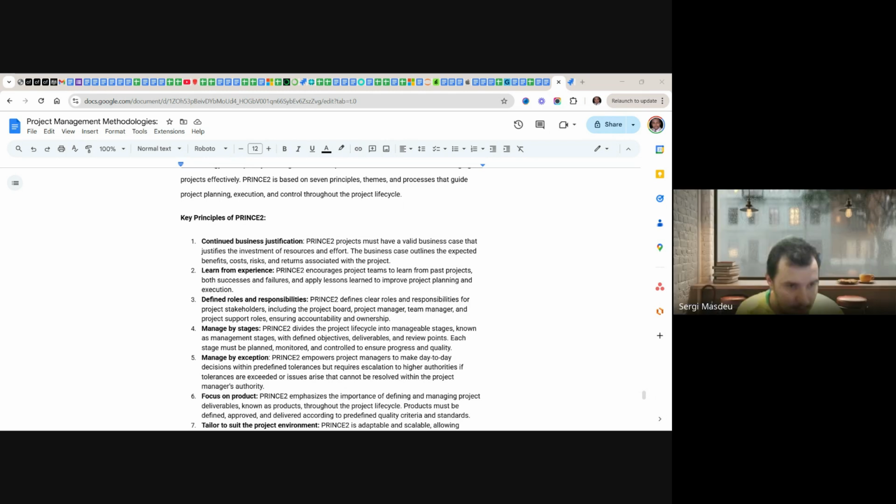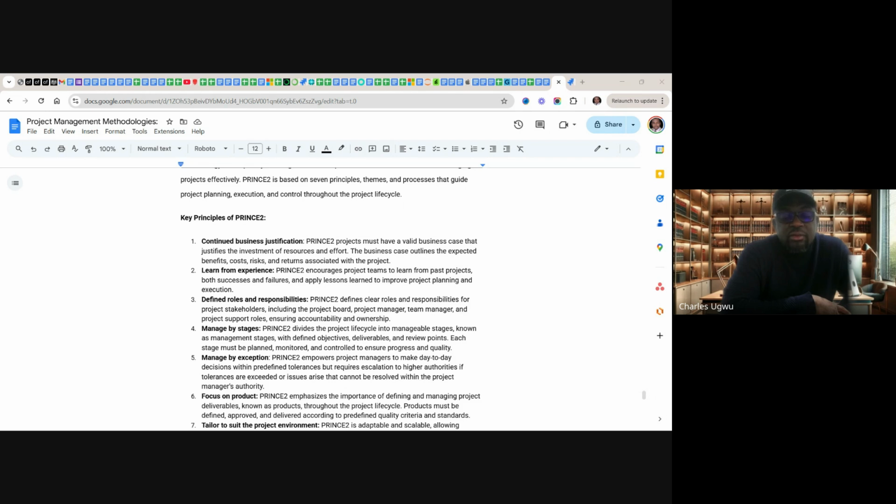Yeah. So I want lesson learned to be added to that read meeting. So the day you people have read meeting, after read meeting, you start lesson learned meeting immediately. Lesson learned doesn't require much. You just find out what happened, what we didn't do well, and how you would have done it very well. We call it lesson learned.